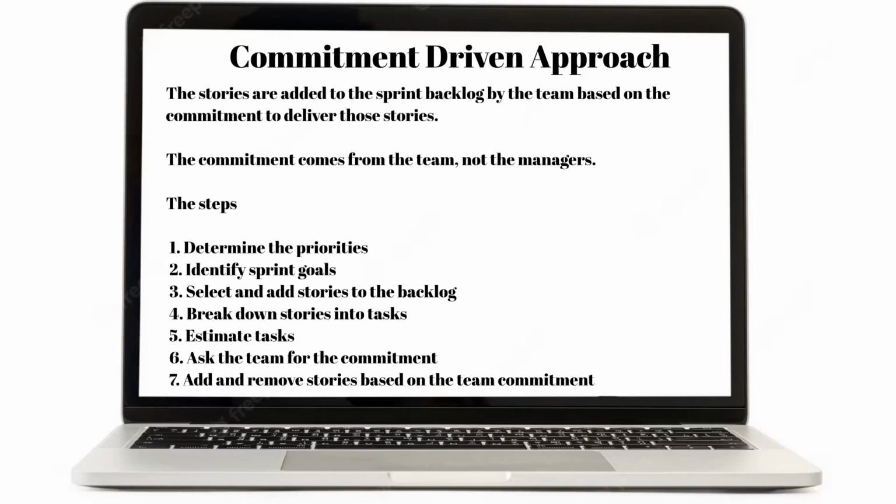Let's walk through the steps. Determine the priorities. Identify sprint goals. Select and add user stories to the backlog. Break down stories into tasks. Estimate tasks. Ask the team for the commitment. Add and remove stories based on the team commitment.